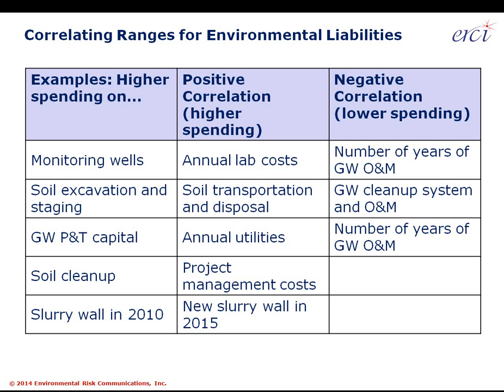This line item is based on some research that MIT did for the environmental community. Back in 2002, it did a survey of slurry walls and found that every single one ever installed for environmental containment and management had failed. The joints going vertically down through the groundwater table into any bedrock, and then going laterally connecting with any other slurry wall joint, are complexities that are right now beyond practice.